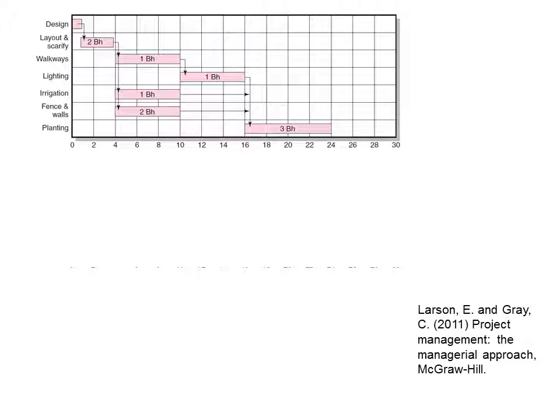You can see there's a series of activities down the side for this project, and this project is a kind of external work project, which requires something called backhoes. BH stands for backhoes. Okay, these are little JCB type diggers, and you can see that the first activity or design is carried out. Then the first major activity requires 2 of these machines, and then there's 3 activities which are scheduled to happen concurrently, and between them they require 4 of these machines.